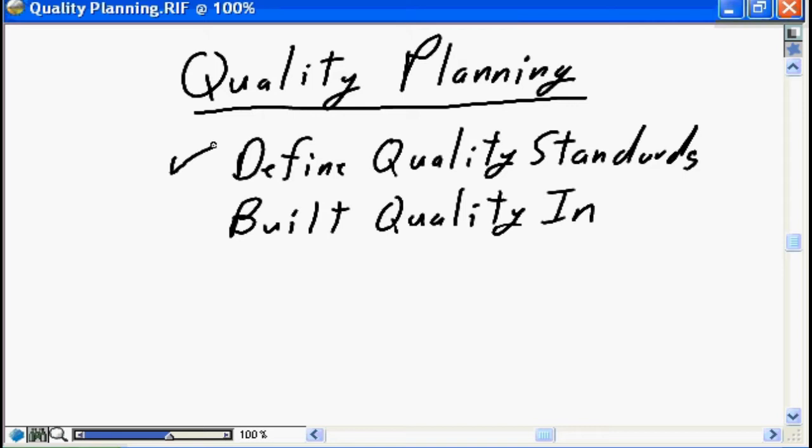A project to develop a conference room scheduling system to ensure that the conference room in your organization isn't double booked may not have, and I would suggest should not have, the same level of quality built into the project plan. That may be acceptable, that there may be a bug. It may be acceptable that the room gets double booked on certain occasions after the third or fourth cancellation. Therefore, the quality expectations for the conference room scheduling system will be very different than the quality expectations for the mission-critical, life-threatening application. You need to understand what the customer's expectation for quality is going to be.